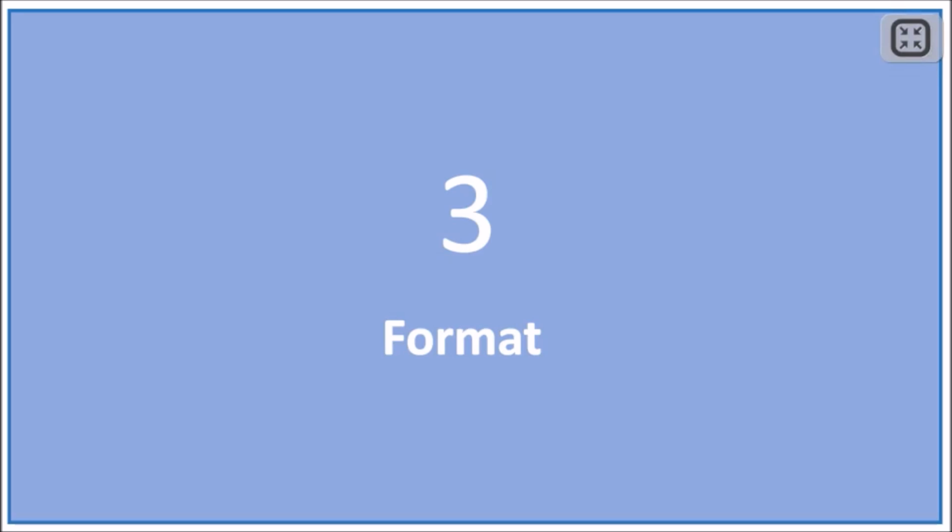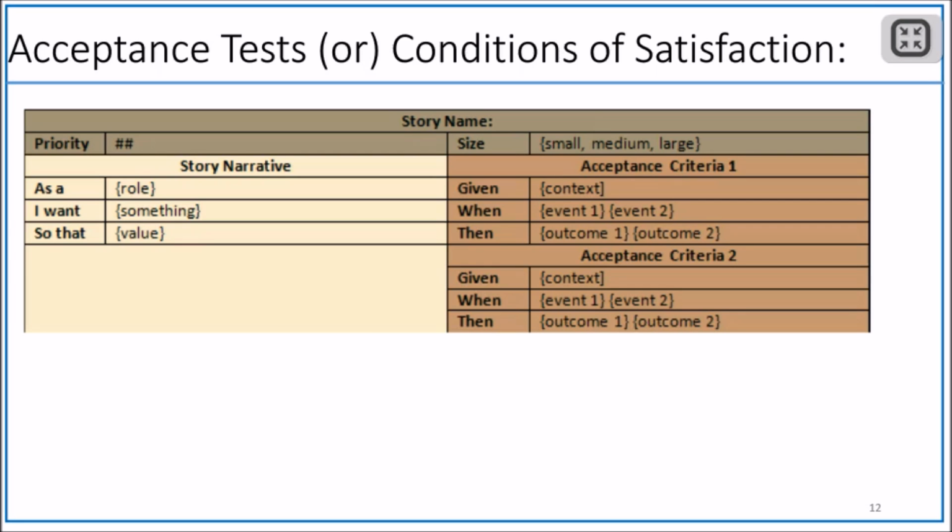Let's take the structure for a moment. The user story needs to be as a role, I want something, so that I can achieve this. We definitely want the role, we definitely want the something, which is the functionality, and the so that, which is the benefit. So typically, we want the user story to follow this format, but in some obvious scenarios you can omit the so that clause.